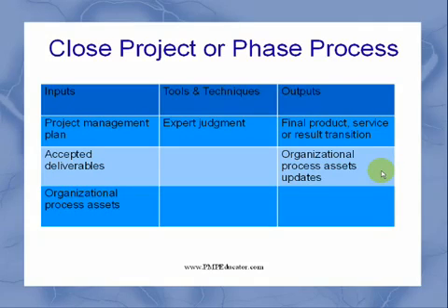It will help the next project and the project manager for those projects to go through the projects, because the information you have will be a key resource for them for similar projects. So basically, the input for this is also organization process assets, but consider that the output is actually the updated organization process assets. So you have updates for the existing organization process assets of your organization.